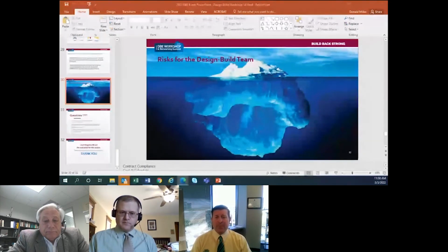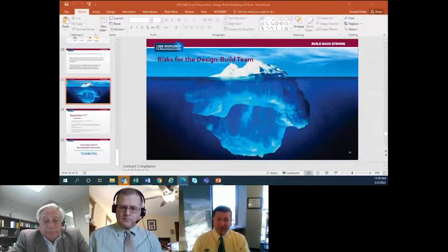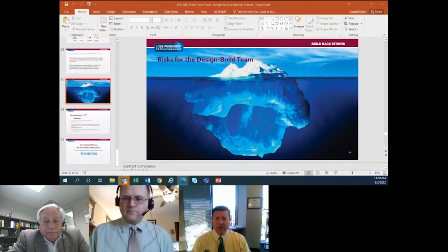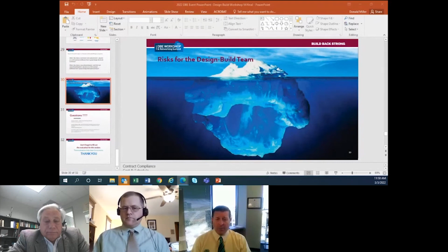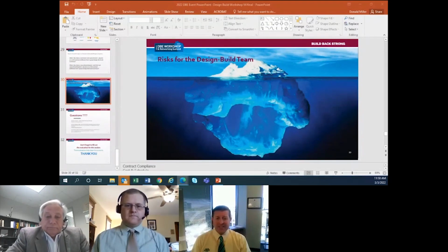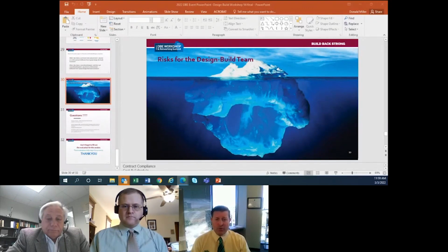There are great example contracts there, a professional services agreement from the contractor to the designer, and they lay out a lot of the framework about who's accepting the risks, and they're fair, well balanced and good contracts. To be honest, our professional services agreement is loosely based upon the framework that the DBIA contract structure has put forth.